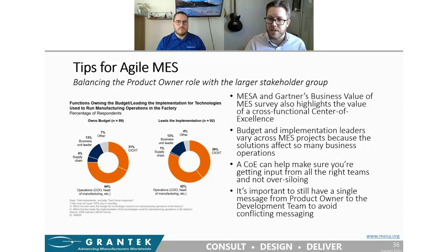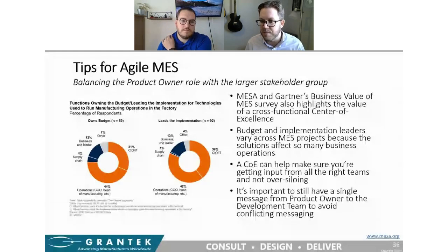The guidance from MESA, which I certainly personally agree with, is to develop a center of excellence, or COE, to help support your product owner. So you still do want, in general, a single product owner to be responsible and the main channel of communications to the development team. But that product owner can have a team behind them as well. They should have a team of various stakeholders all supporting them to make sure that all groups' needs are considered as you are developing your MES solution.